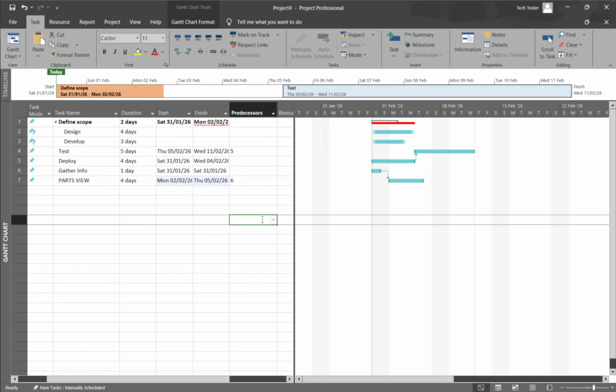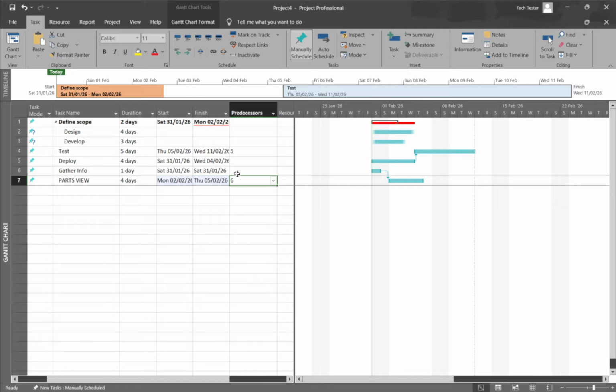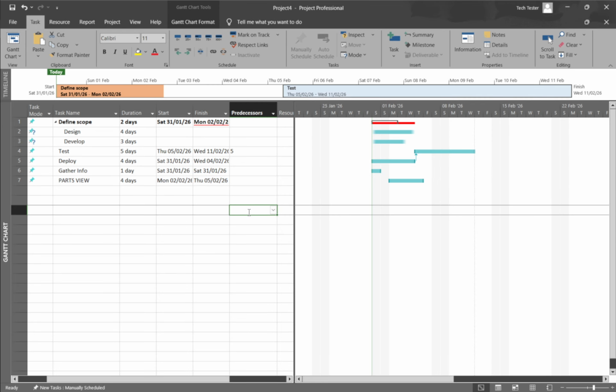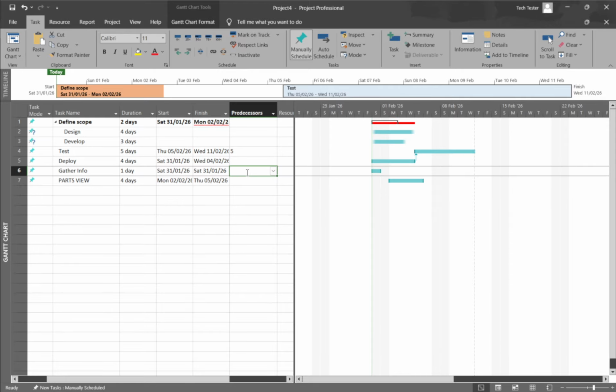After you've added tasks, you can refine them directly in the columns next to each task name. Click the Duration column to set how long the work should take, and use Start and Finish to align timing. In the Predecessors and Successors fields, establish relationships to control the order of work. In Resource Names, assign the people or teams responsible. Fill in only what you need for now. You can always return to adjust details as your plan evolves.